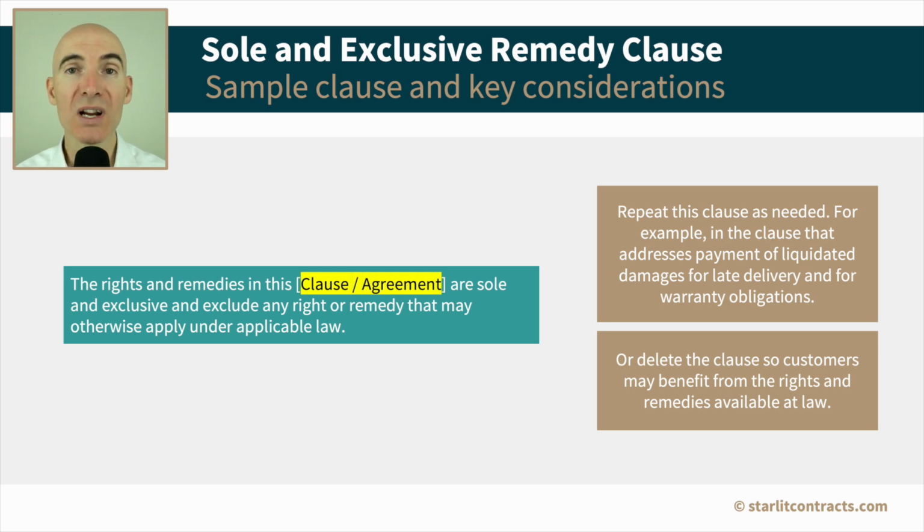Now, when the parties agree that the remedies described in the contract should not be sole and exclusive, or, especially if you're a customer and you're producing template contracts to send out to your suppliers, you might just omit this language. Do not include it. It then becomes the responsibility of the other party, if they're aware of this risk, to include the sole and exclusive remedy language if it's something that they decide is important to them for that deal.